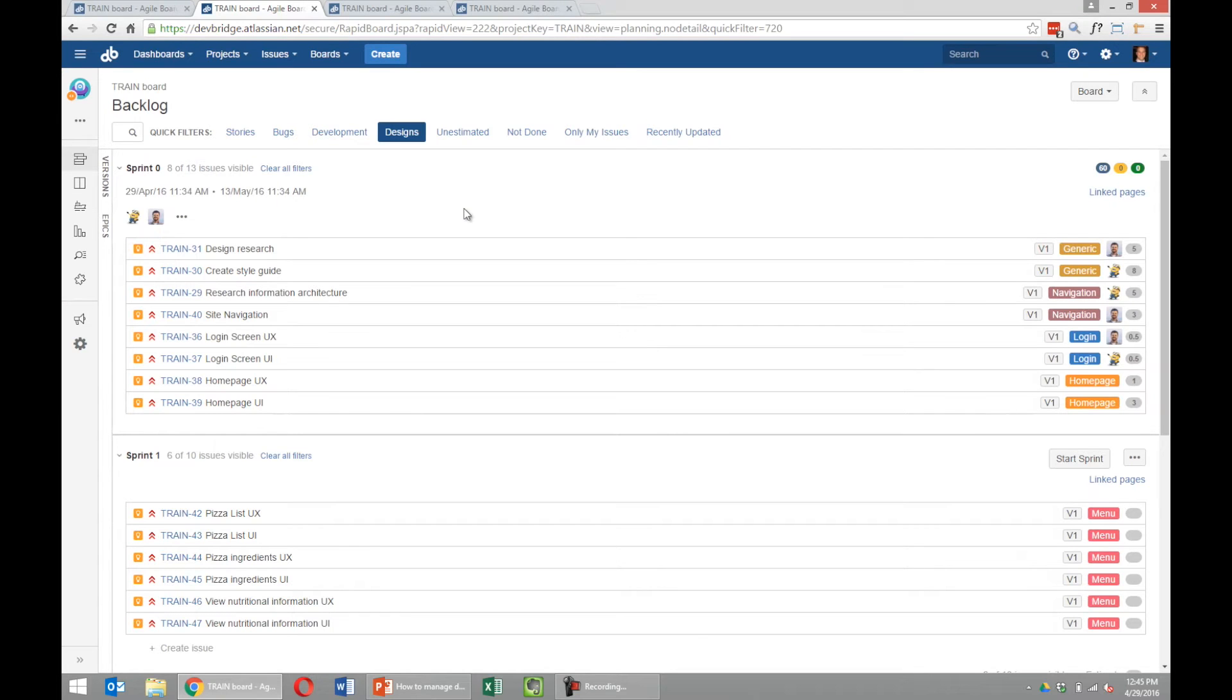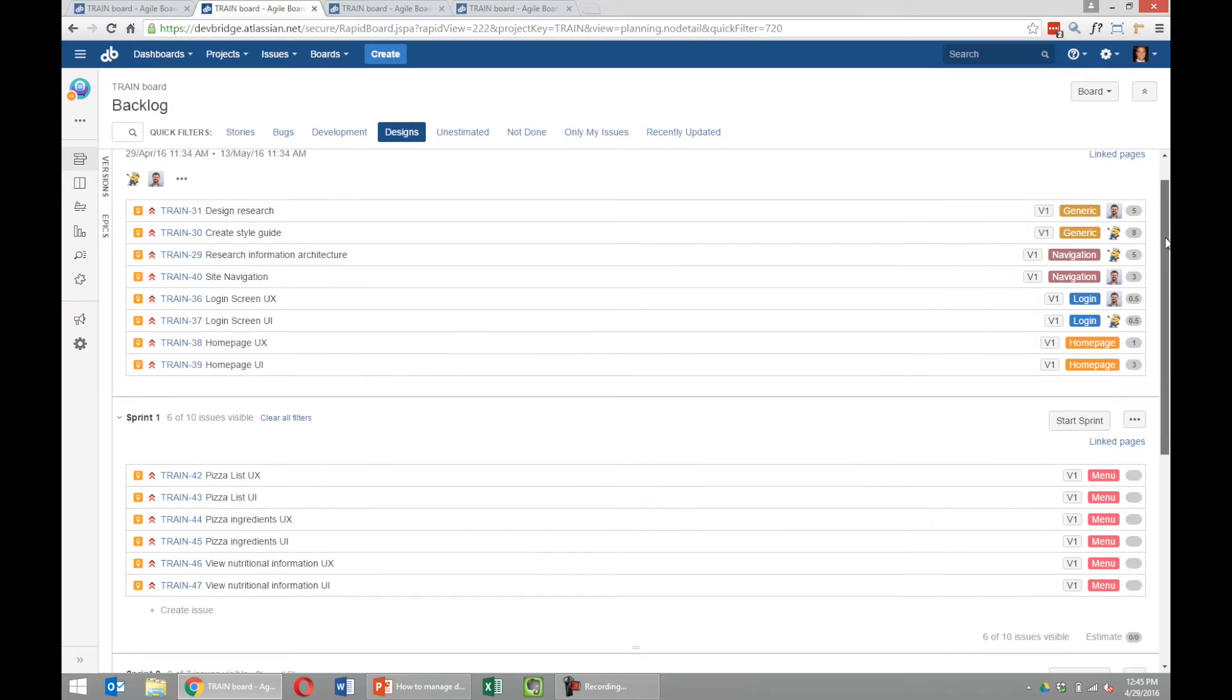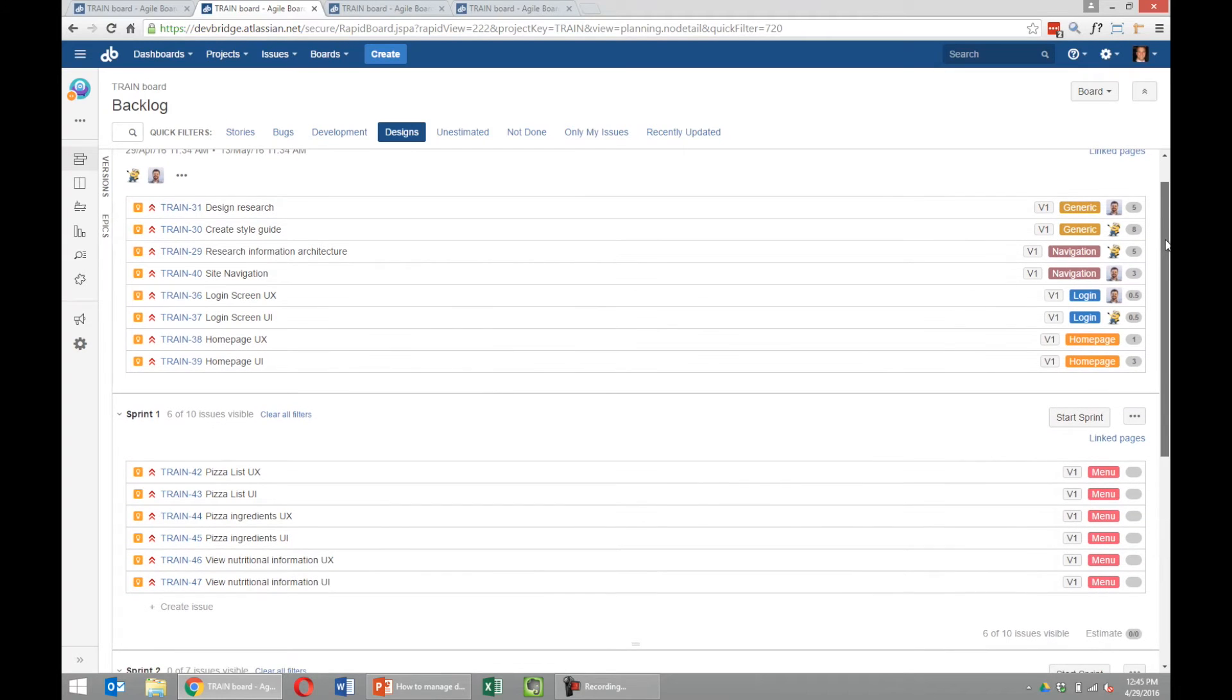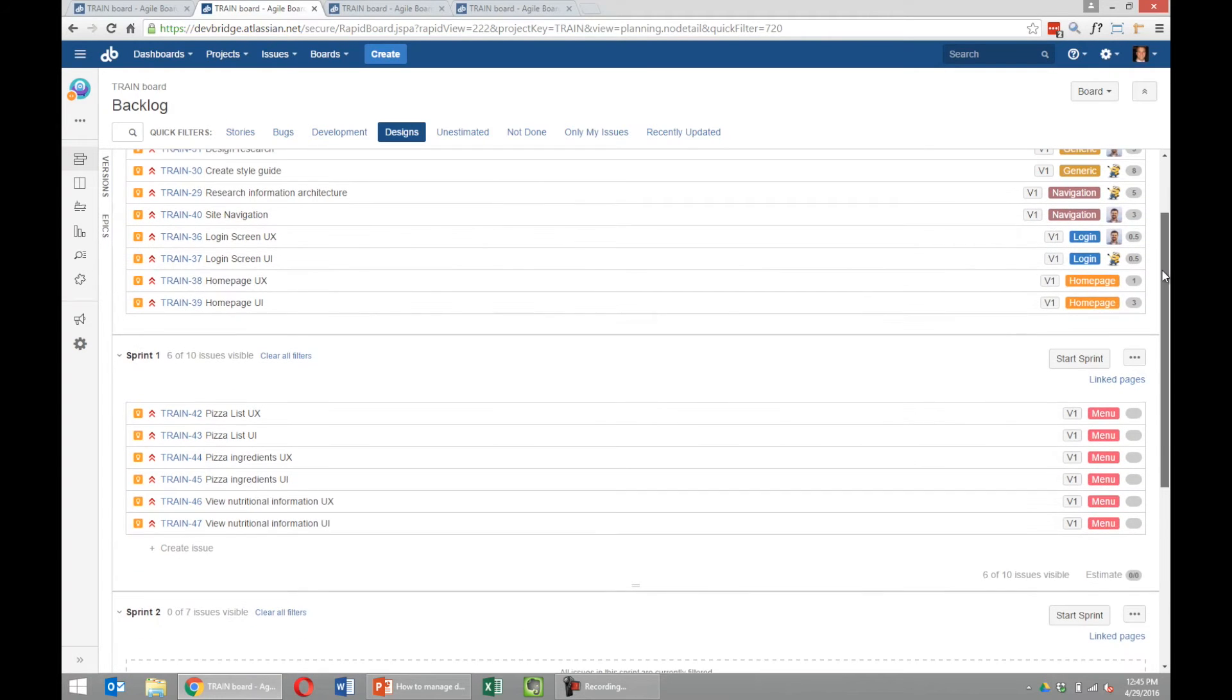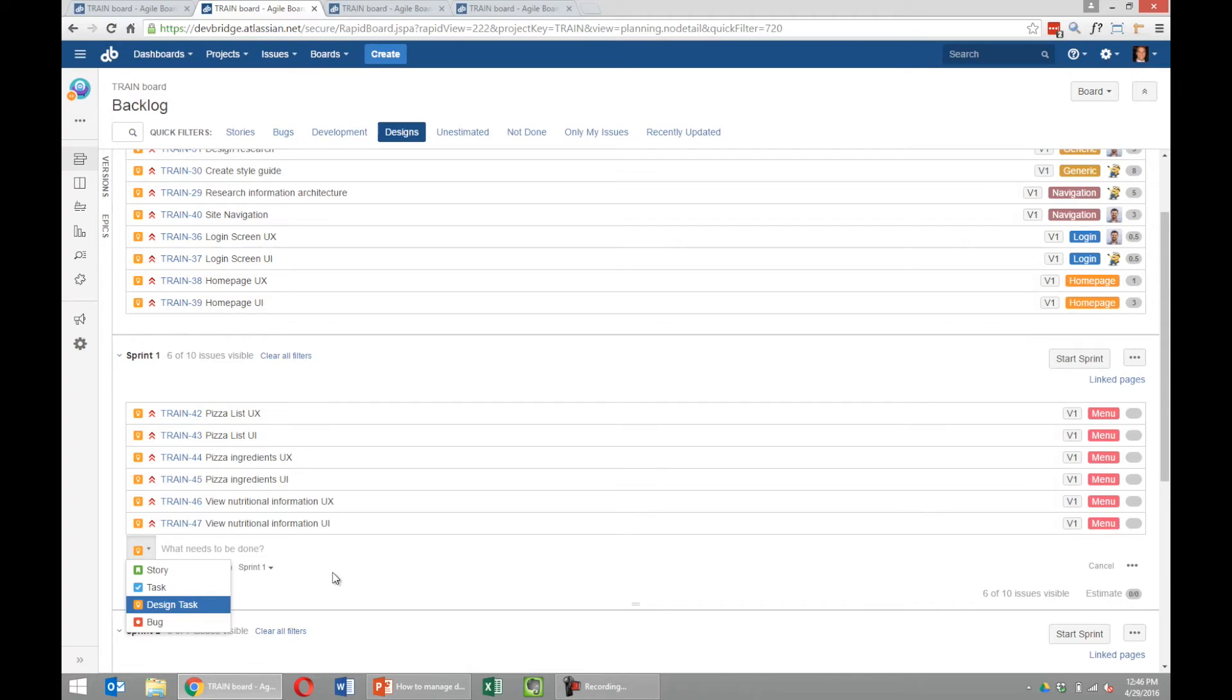When we start building this functionality out, we can create these as individual design tasks. Normally we've been creating these as tasks inside of JIRA, but they're not really tasks—they're actually design tasks. We've created a specific issue type called design task that allows you to control what it's doing: is it UX, is it UI, is it style guide, branding, mood boards—whatever it is. You can filter and report on it individually and independent from all the other development tasks, so it won't impact any of the reporting we do within development and release planning.